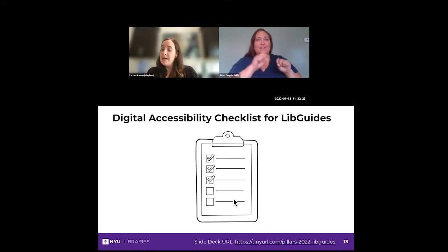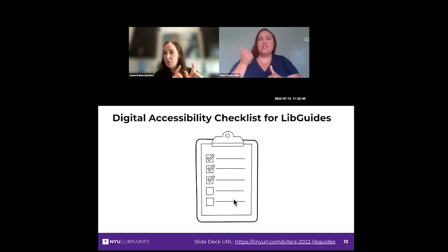Okay, the remediation milestones were arranged so that content creators could gradually progress through them and build up their skills to encourage long-lasting behavioral change. We didn't ask guide editors to do everything all at once, right? Again, across these 3 months, we gave 2 week pacing to get through the milestones. This enabled folks to build confidence and to know that they would be able to actually do this work and that it wasn't going to be too daunting.